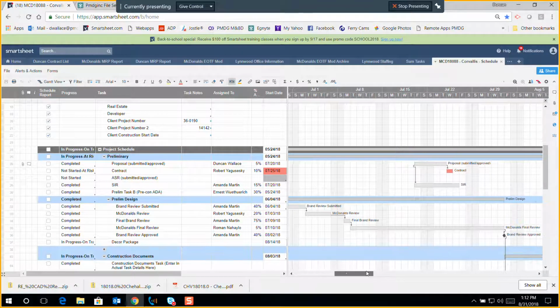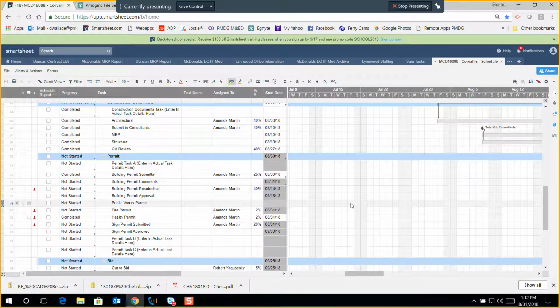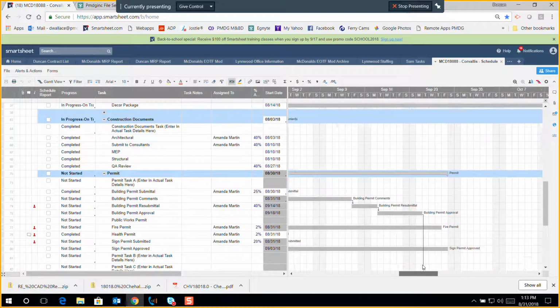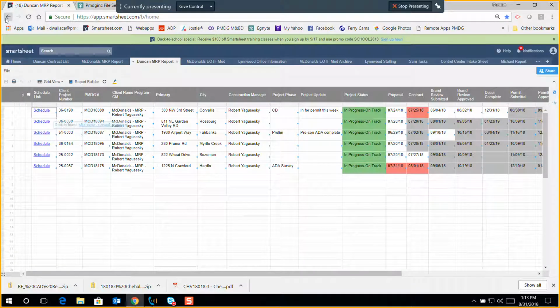They hold the contractor. They don't give him the final payment until they have the post-ADA. But architects, we get paid because we don't do construction administration. The minute I submit, I just bill everything. And then what's left are the reimbursables. Usually that's the one that I keep open, billing here and there for any reimbursables, since sometimes you get them late.